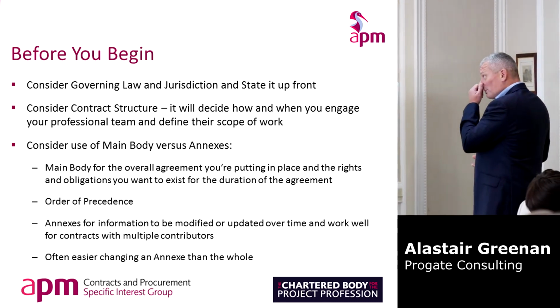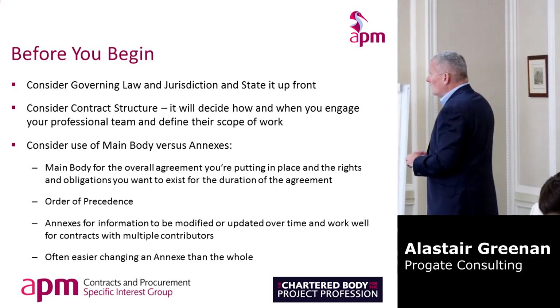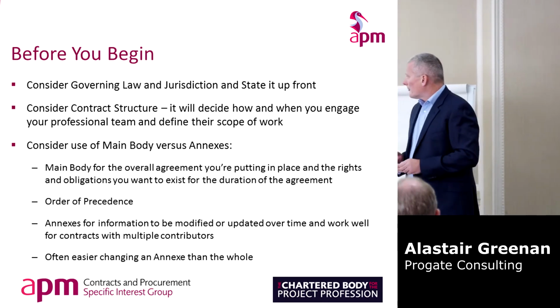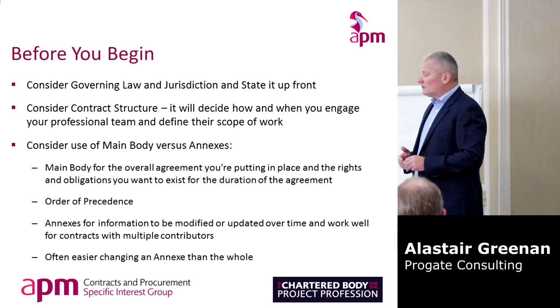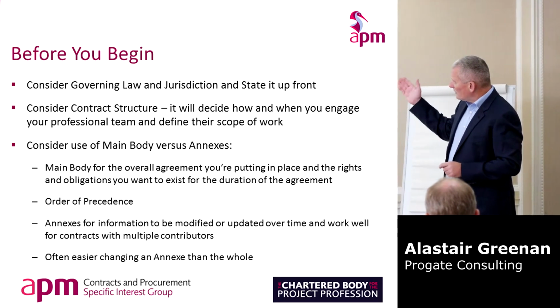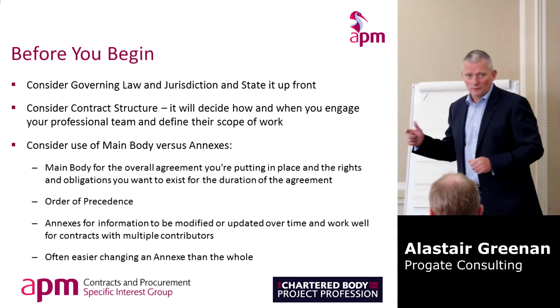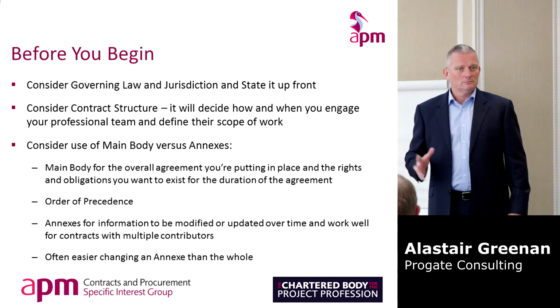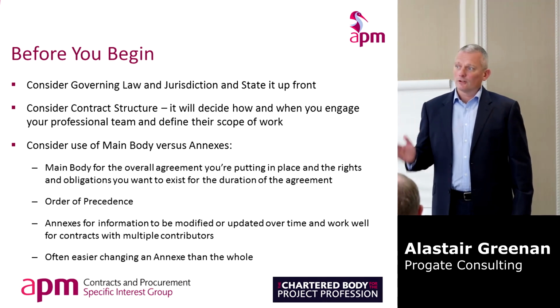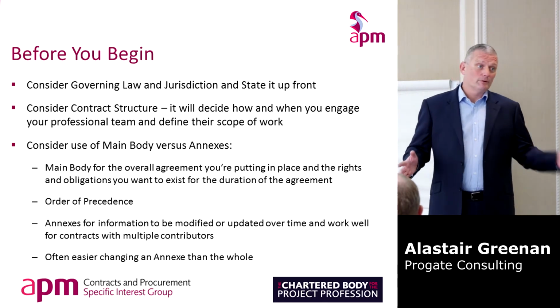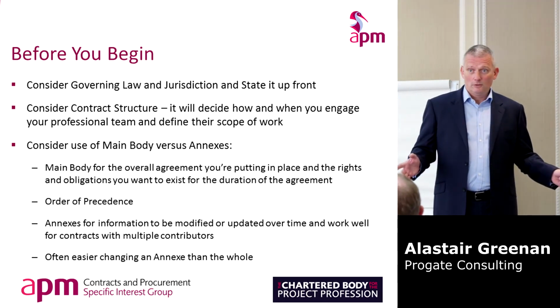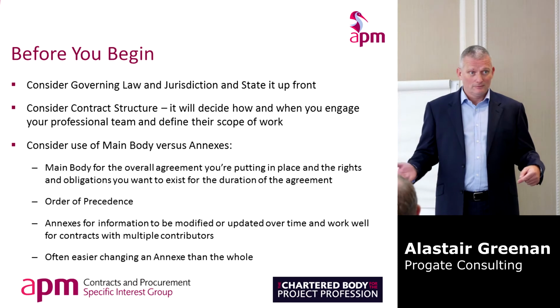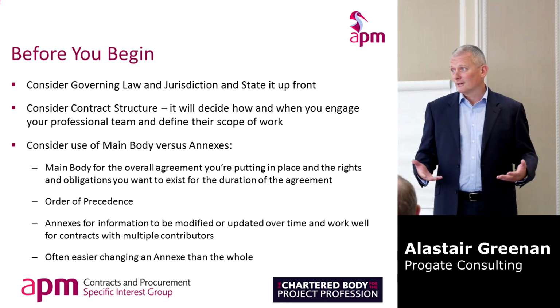Be clear on the order of precedence. And that's probably it. One of the things in terms of contract structure, I think I mentioned it either before or later, is a really good rule for any kind of contract: ideally you want to say it once in one place and then refer to it. Otherwise you get variations and other things for the same definition, a lack of clarity. Okay.